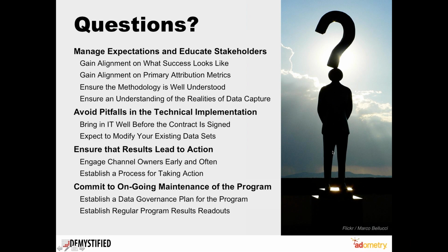And especially during the initial implementation, this can't just be tacked on to resources who already have overfull plates, with someone saying, oh, maybe you spend a couple of weeks helping get this rolling as well. There needs to be a core team that is identified internally, and what projects are they rolling off of, so that you can have a program manager or a project manager who really has the time to lay out all the moving parts and make sure that things are happening. So that's for the implementation.